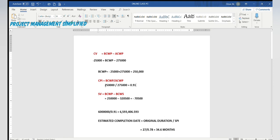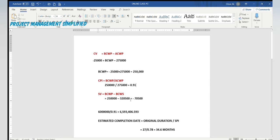Now let's get the second piece of information we need. The CPI is BCWP over ACWP, and with the available data we get 0.91. We also require the schedule variance, which is BCWP minus BCWS: 250,000 minus 320,000 gives negative 70,500.